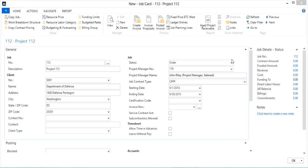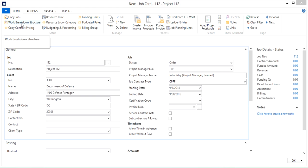The next area of the job setup that we're going to look at is the work breakdown structure. The work breakdown structure is used to define the tasks for the job and determines where your costs will be tracked. Let's click on the work breakdown structure link in the ribbon of the job card.